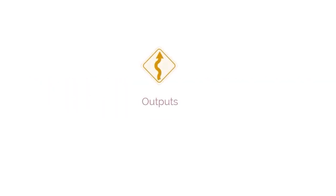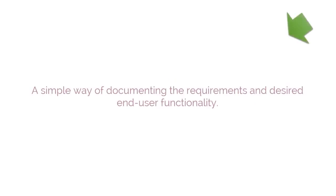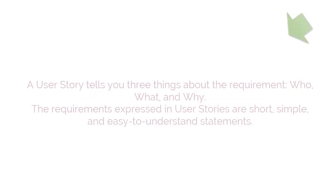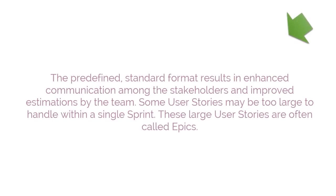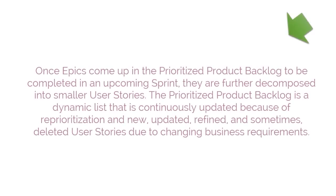The mandatory outputs of this process are User Stories and User Story Acceptance Criteria. User Stories are a simple way of documenting requirements and desired end user functionality — telling you who, what, and why. The requirements are short, simple, and easy to understand. Large user stories are called epics, and once they come up in the backlog, they are decomposed into smaller user stories. The Prioritized Product Backlog is a dynamic list continuously updated due to reprioritization and changing business requirements.